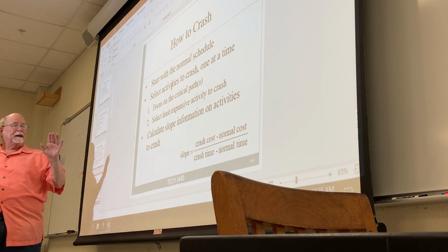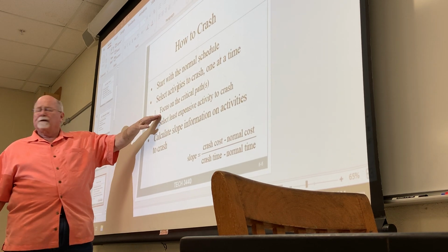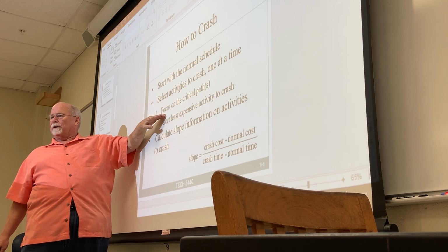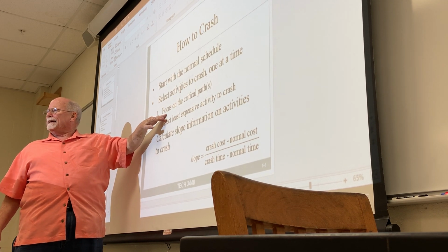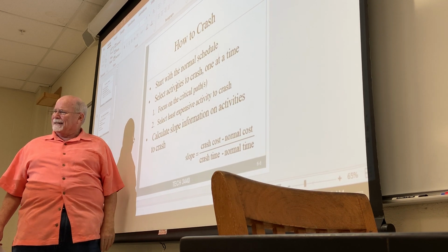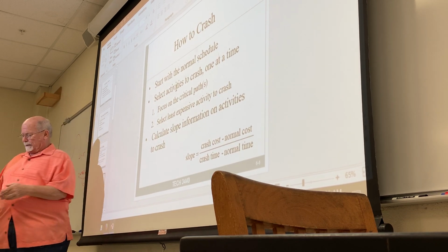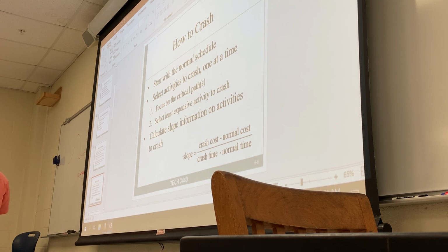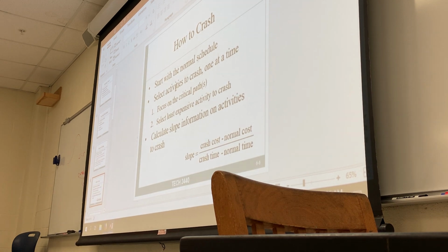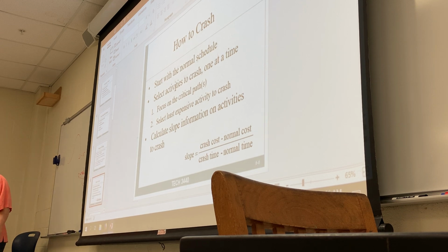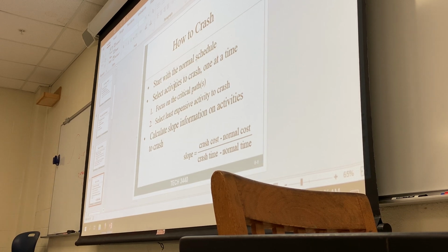I'm going to say that's absolute. You only do that on the critical path. You don't waste good money expediting something that doesn't need to be expedited. Only the critical path needs to be expedited. That's it.